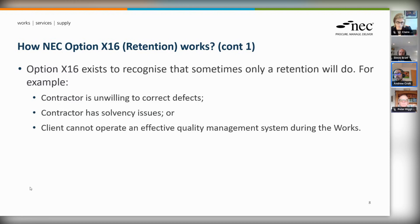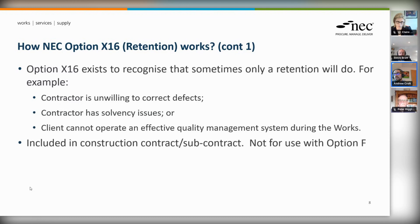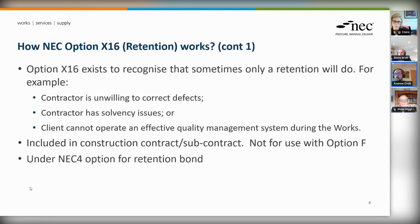X16 is included in the ECC and the subcontract. It's not included in the professional services contracts, and it's also not intended to be used with Option F, which is the management option, because it's not appropriate when that option is used for the contractor to have sums retained against defects. One new aspect of retentions in NEC4 is that there is an option to require the contractor to provide a retention bond as an alternative to deducting a percentage.